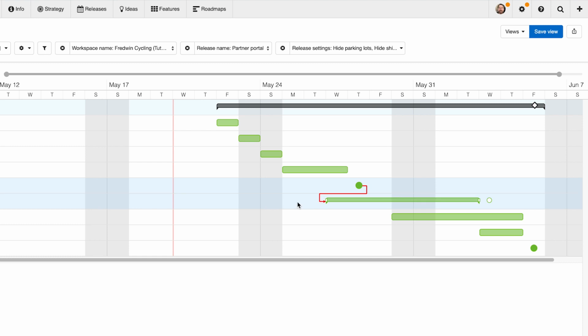and you'll notice that the line shows up red, and that's not good, but it's really useful, especially because we haven't started on this release yet as a team, and I'm able to, as a product manager, see that there's trouble with my timing right here before we even get to it. And I can maybe get that addressed. Again, there are different ways to resolve this. I could talk to the product team and say, you know, guys, we really have to get that review done sooner.